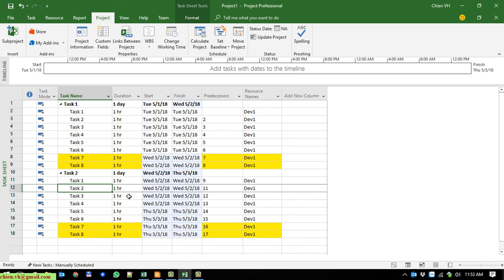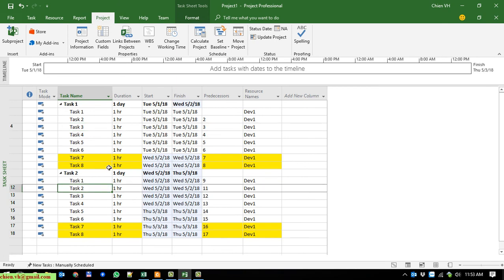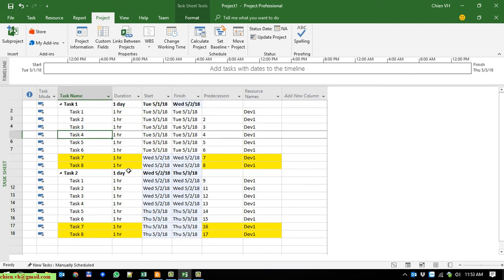After we change the working hours from 8 to 6 per day, the tasks highlighted in yellow have changed to a new day. For Task 1, sub-tasks 1 through 6 total 6 hours — that fills the first working day. So sub-tasks 7 and 8 are moved to the next day, 2 May.